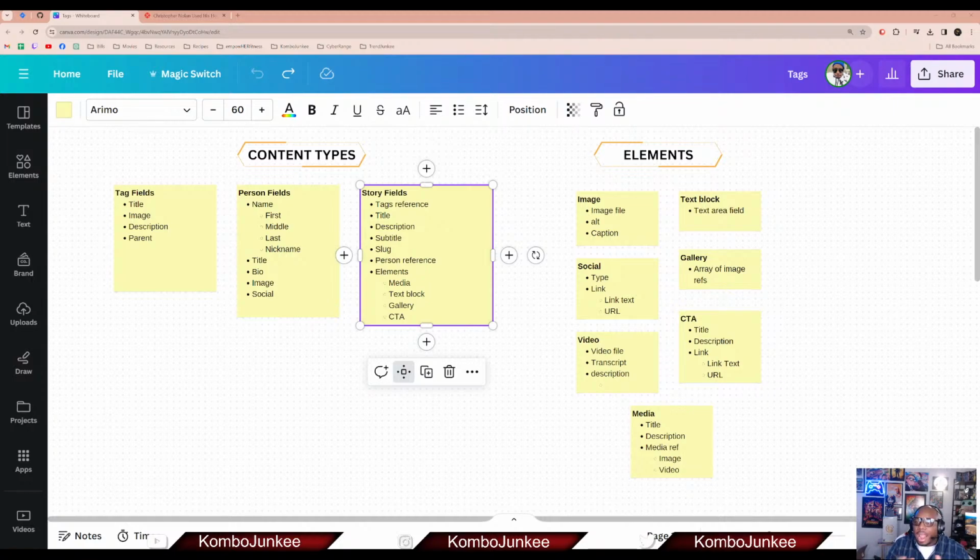So if you were able to successfully do the first ticket, that one developer, but then when you looked at ticket 2 and 3, number 3 didn't get completed, you may want to fine tune some of your guesstimations, right? You may want to look at some of the work that you're saying that you can pull off in a sprint, and you may want to make adjustments. And that's the sprint review. And that kind of rolls right into the sprint retrospective.